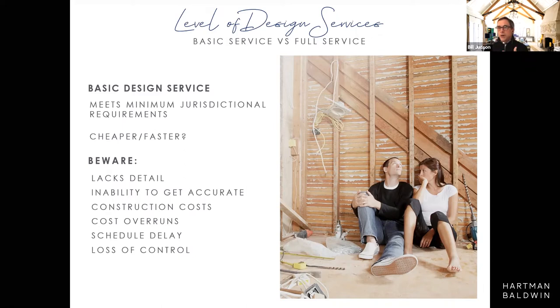Now, it's also going to be tough to get accurate construction costs. For example, if in your kitchen, your drawings have a rectangle and an arrow pointing to it that says kitchen cabinets, and you're getting three bids on this, one person may be getting their cabinets from IKEA, one person may be thinking that they'll get them cheap from Indiana, and another person may think they're going to do them all fully custom. Now multiply that out by the hundreds of decisions that happen as you go into a construction project. That can just balloon or shrink in a very unrealistic manner.